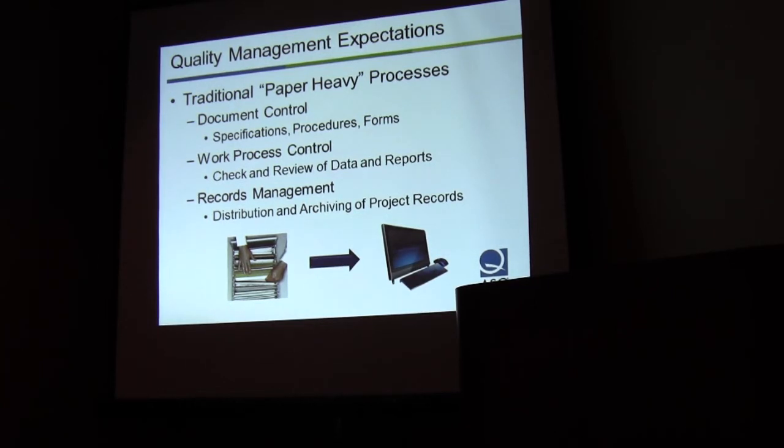Traditionally, the work process has been the inspector goes out, they observe, they do their tests, they write it out on their report. Maybe they take some photographs of what they've seen. They may also capture some documentation from the office. Say if someone's doing a concrete test, they'll get a batch ticket from the truck that indicates what batch of concrete was delivered. So you get all this paper that starts piling up, all of this documentation. That usually then gets turned into someone to do the review of. They'll sign off on the report, and the report will then get transmitted finally to the client.